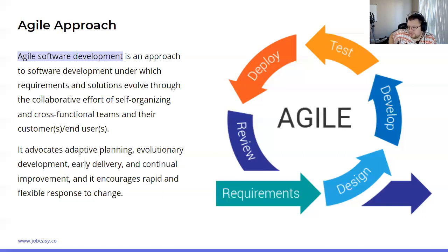And then when the sprint is over, those two features were built. Now you can add comments on Instagram and add filters. The new sprint starts. And that can also go for 2 weeks or a month or 2 months. Then it stops, and some other features are being added to work on. And so pretty much the process repeats itself every sprint, right? It does go through stages, but those stages are repetitive and they're short. You don't look at the whole project at the same time from beginning to end. You pick a set of features that the company will be working on, and then in a short period of time they deliver those features and add them to their product MVP, and the product gets more and more complex.